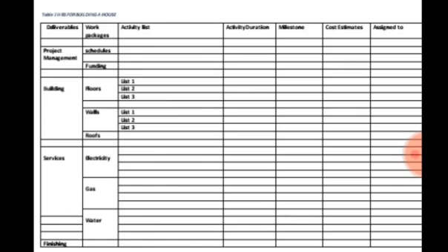Then under the same floor, what is the next in the list two? Now the next activity there could be laying of the blocks in the foundation. Your first activity was to dig the foundation. Then the next activity now is to do what? To lay in the blocks in that foundation. Now the next activity's duration. How long is it going to take for you to lay the blocks in the foundation, probably to the DPC level? How long is it going to take? You understand? Then maybe let's say you say another 3 days.